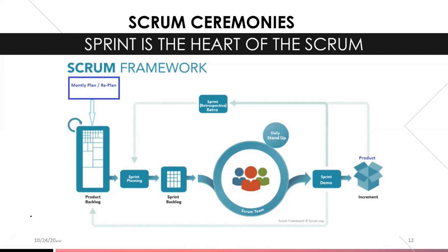So the product backlog is your list of all requirements. You could think of list of the high-level requirements. And then from the product backlog comes into sprint planning. So as I mentioned before, a sprint could be a duration of 2 weeks, 3 weeks, or like my high-performing team, 1 week. So the product owner says, okay, these are the top priorities that are going to be planned into this sprint. And then that goes into what's called the sprint backlog as well.